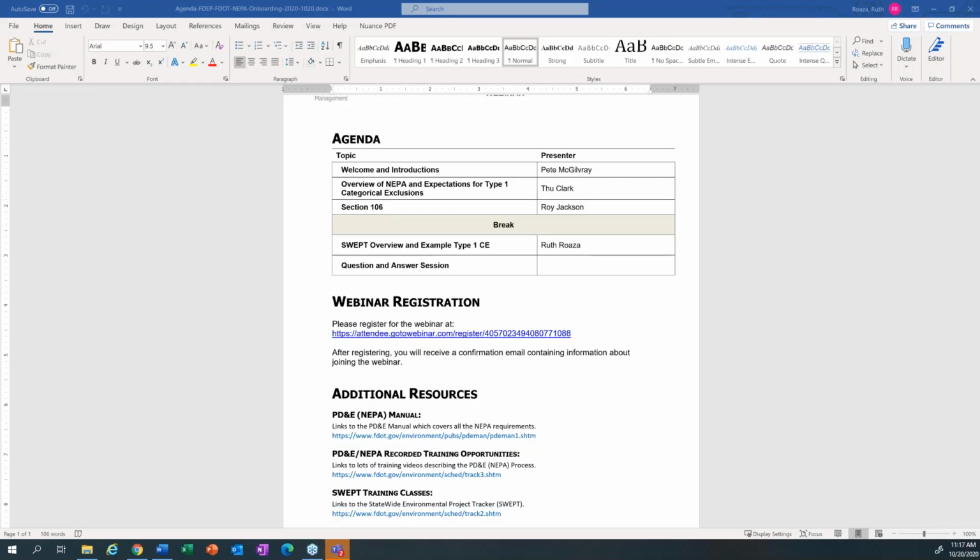So as far as the planning expenses, grantees can only request up to 15% of the total project cost. So unfortunately, if there's a large chunk of planning expenses for your project, the amount that is eligible for reimbursement is only 15% of the actual total project cost. That's all that we are allowed to reimburse for as far as planning expenses go. The other remaining costs are to be paid for by the grantee.